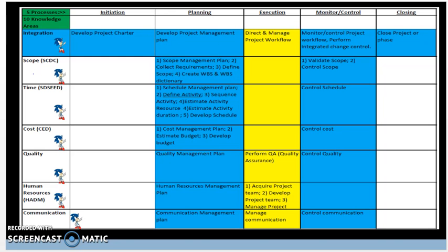Now that the scope has been planned for with a scope baseline in place, the next step is to control the scope to ensure that we meet the customer requirements. Remember that the scope baseline is what the project team and the end customer have agreed upon as the final version of the project scope. The purpose of this process is to monitor the status of the project and product scope so that it does not go against the scope baseline. When controlling the scope, we must manage and minimize change requests because they prolong the project timeline and increase the budget, both of which we want to avoid.